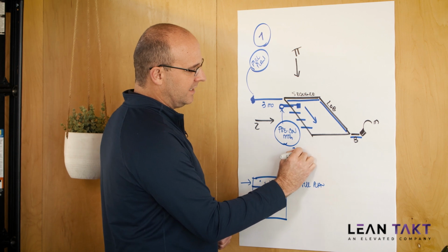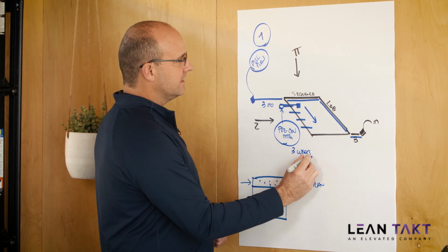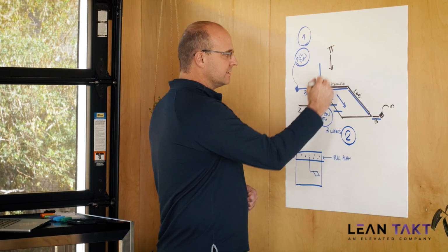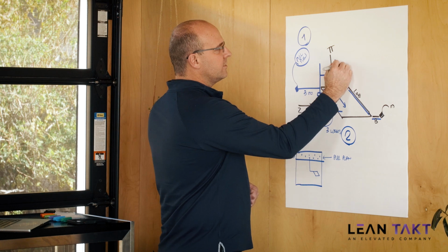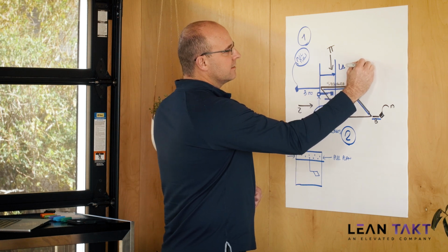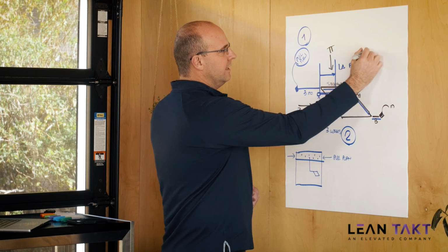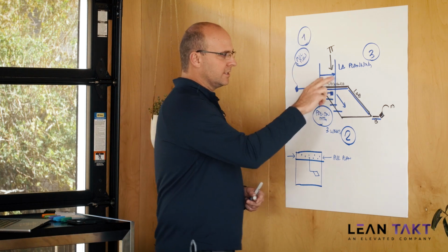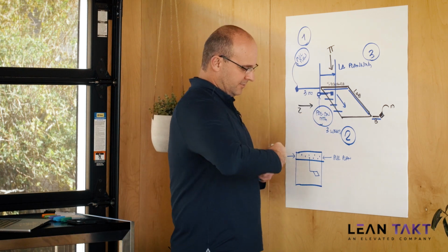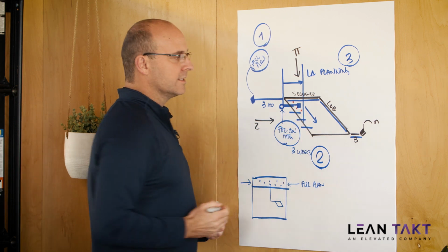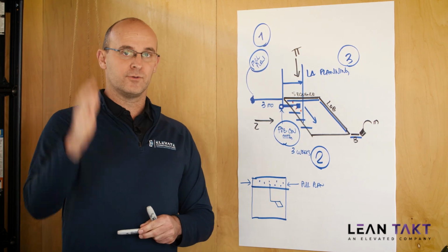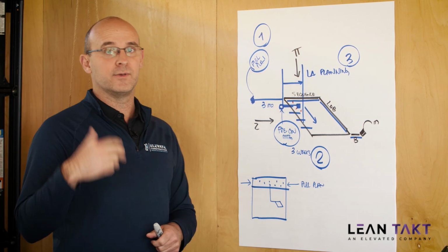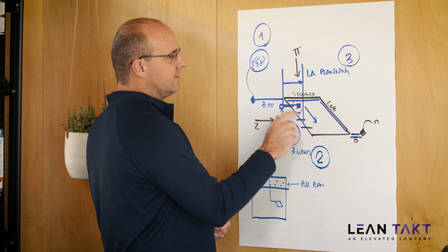And this happens 3 weeks ahead of the work, and that is habit number 2, okay? Habit number 3, and I'm just going to draw it like this, is to always do what's called look-ahead planning, okay, with your 6-week make-ready look-ahead plan. That's habit number 3. That's where you go through and you, with your trade partners, look at the plan out 6 weeks ahead and attempt to find problems, little roadblocks in that duration, and to remove the roadblocks before you get there, and to also make work ready, and to align material procurement, equipment, and resources and information to these dates.